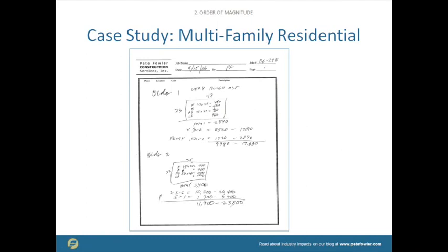And I knew that the buildings were in rough condition on the exteriors. So I thought, if we were to just reclad this whole project, I needed to know the recladding, so I just took measurements. This is the building. So the front, the back, the left, the right. I literally did this from Google Earth. You can use a measuring device on Google Earth.